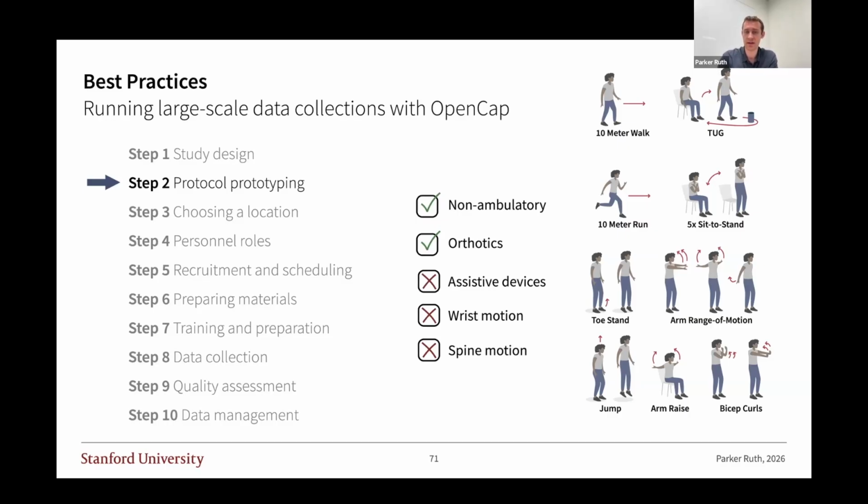Testing is also the right time to test how long it takes to perform the protocol, because once you know the duration of going through all these tasks, it'll help you to plan your large-scale data collection.